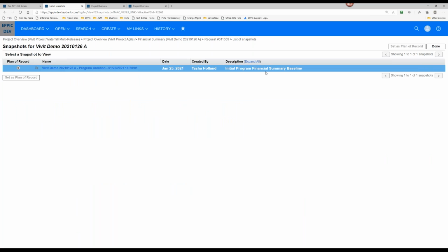So whatever was originally created or promised on the business case proposal as part of the initial funding request gets baselined on either the project or the program that was spawned. So we always have that initial funding history. Okay.